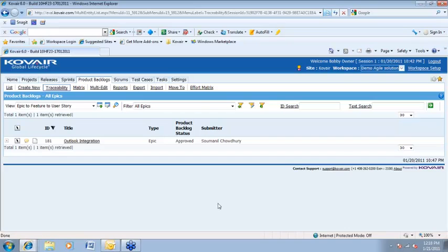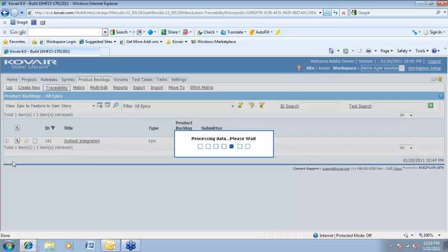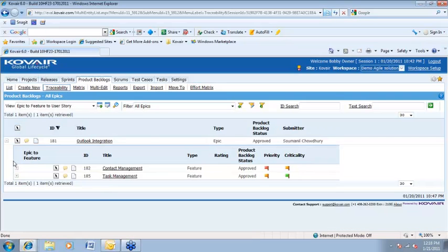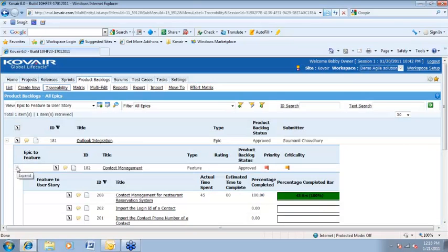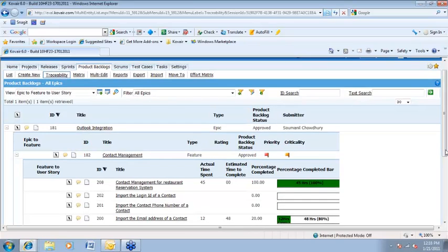At the top, we have kept epics. The epics are the customer specifications that are received at a very high level. Now, the epics are broken down into smaller features, and further, a feature is broken down into smaller user stories. Then these user stories are evaluated, estimated, assigned to sprints, and eventually get worked on.